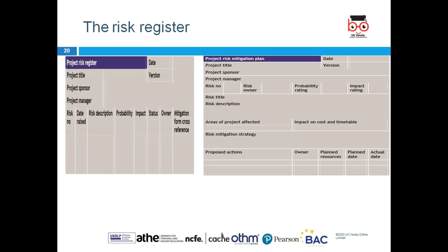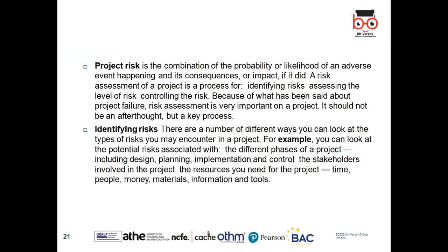So companies maintain a risk register for the project. We can say this register is maintained for this project, and what are the areas of risk and what strategies will be in place. For example, if we have a currency fluctuation, we can use a hedging approach when dealing with foreign currency, so our exchange rate stays fixed instead of flexible. So with different probabilities, we can use strategies to counter them. So we can use these registers.